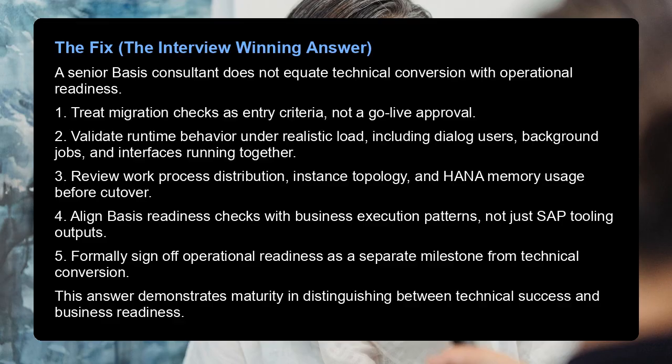The fix, the interview-winning answer. A senior basis consultant does not equate technical conversion with operational readiness. 1. Treat migration checks as entry criteria, not a go-live approval. 2. Validate runtime behavior under realistic load, including dialog users, background jobs, and interfaces running together. 3. Review work process distribution, instance topology, and HANA memory usage before cutover. 4. Align basis readiness checks with business execution patterns, not just SAP tooling outputs.